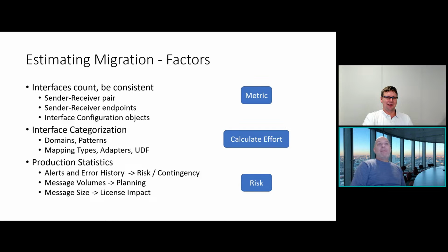I think if you manage to achieve a good level of categorization to begin with, that could actually work quite well. Some things that you have to consider is that in that very quick estimation, there's a lot of inaccuracy, right? Not all simple interfaces will take you 4 hours. Some of them might take you 30 minutes. Some of them might take you 20 hours, right? So there's definitely a variation on that approach and how you come to those numbers.